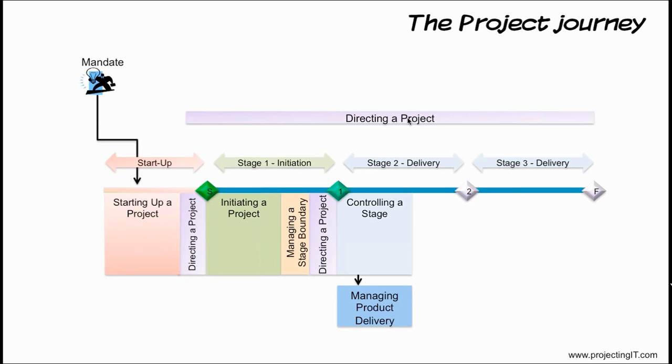The work package also defines the scope of work, the products to be created, the constraints, the development interfaces, like which other teams the team manager will have to coordinate with, the tolerances for the work package, that is to what extent the team manager can take corrective actions and make decisions without having to go to the project manager, and also how the reporting should be done.